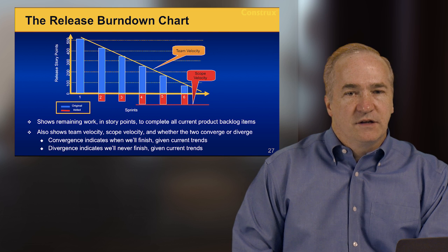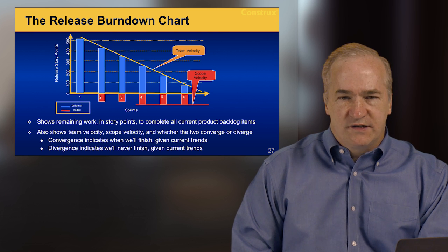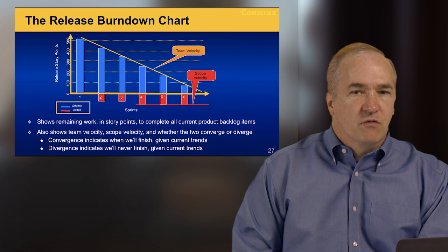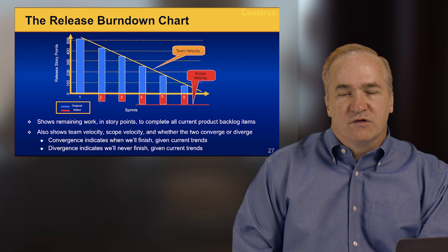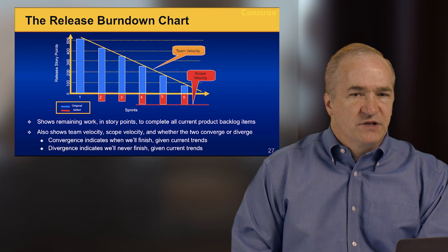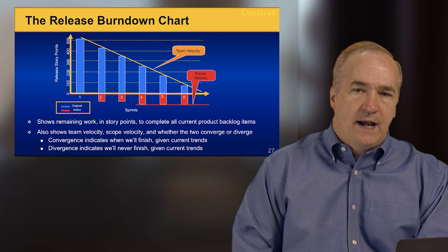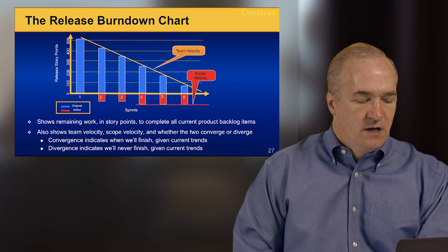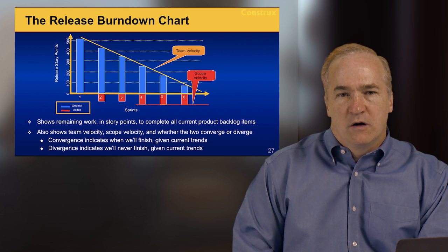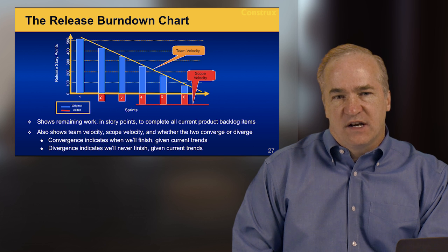So now let's look at the red bars under the x-axis. What does that mean? Well, if you work in the real world on projects, you know that there's always going to be scope added to a project once it starts. Not because scope necessarily changes, but perhaps because our understanding of what the customer really wants changes. So when we add scope to a chart, we add it to the bottom, just as when we implemented scope, we took it off the top of the bar.